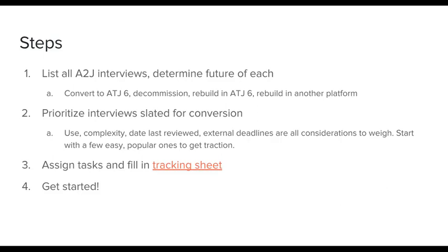Look at the date that the tool was last reviewed. Do you know if the forms are still the correct forms? Does a language need to be reviewed? If you know an interview is going to need a lot of revisions, it's best to not put it as a high priority on the conversion, but you can prioritize it for getting that subject matter review so that by the time the subject matter review is done, you're ready to handle the conversion. And then if you have any external deadlines tied to any particular interview, you want to consider that as well.